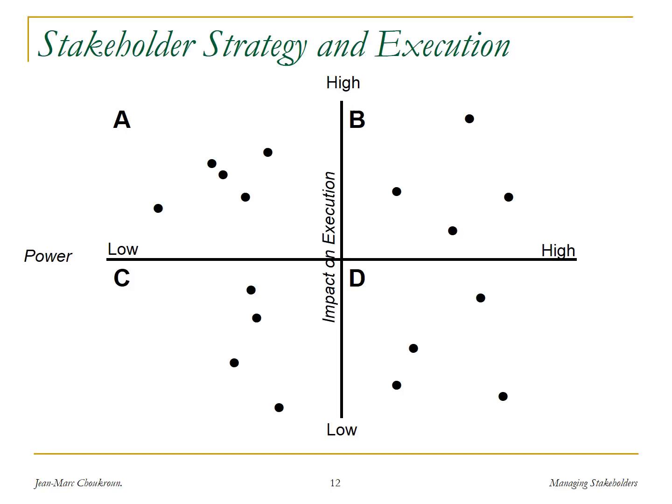So this is when the project develops a new service, a new procedure, a new approach, and then somebody else who is not necessarily part of the project is going to execute, to apply, to implement what the project has developed. Here again, you have then 4 types of stakeholders: those with high power but also high impact on execution, and then high power but low impact on execution, low power, high impact on execution, and low impact on execution.